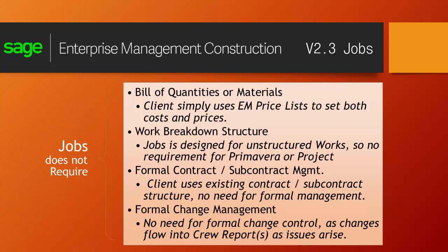Work breakdown structures. We're thinking about this as unstructured work, so no need for a WBS or any of that. No formal contract or subcontract or change management. Again, this is cost plus or time and material or unit price. So if there is an additional work order, well, we just flow it right into the next day's works.